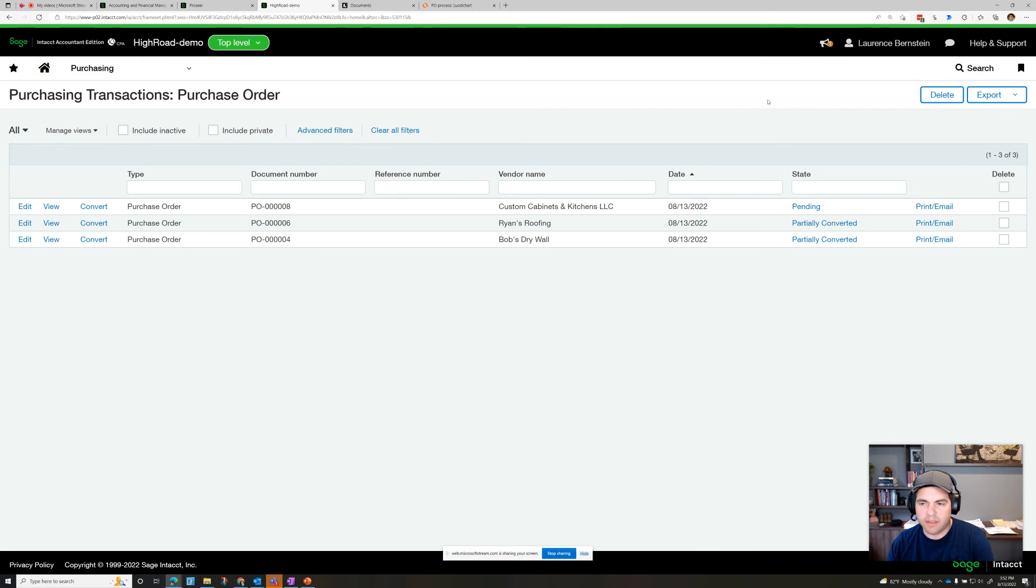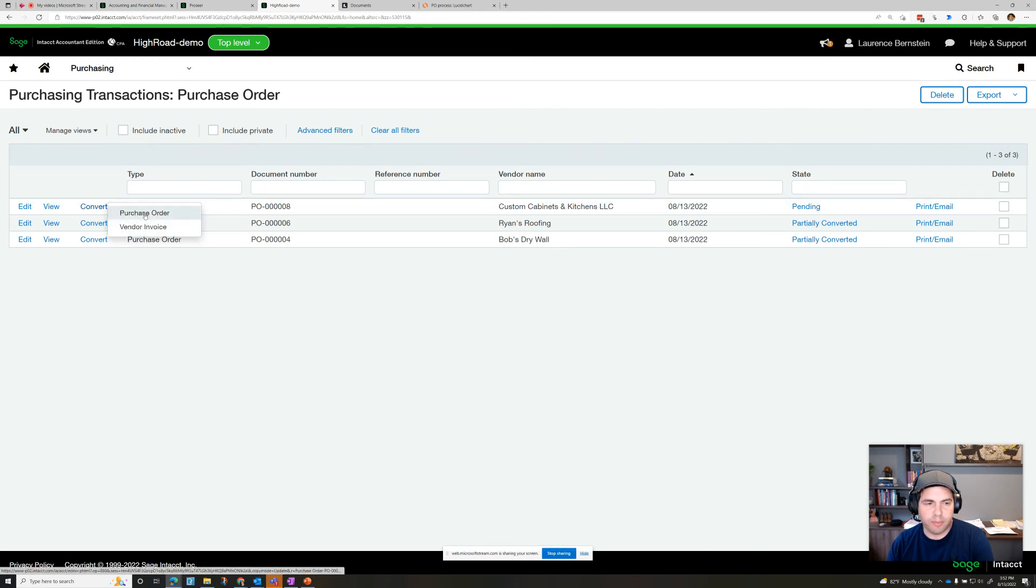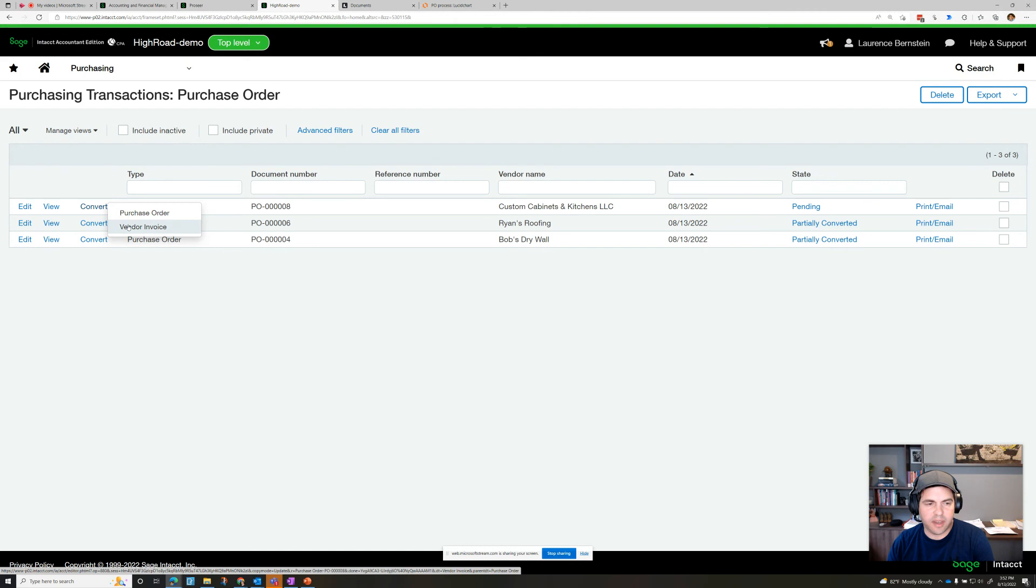And then the next step there would be to convert this to a vendor invoice or merge together multiple purchase orders if we wanted to do that. So that is how we enter a PO.